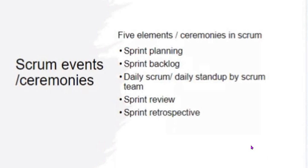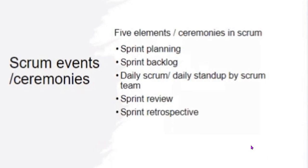Then we have Sprint Review. Sprint Review may take up to four hours. The team discusses what has been done, what is left to do, and how to progress — and it usually brings about an increment. Then we have Sprint Retrospective, which usually has a time box of three hours. We come together and discuss the Sprint we just finished: what went well, what didn't go well, and what we need to add in the next Sprint to make it better. That's basically the Scrum Ceremonies.